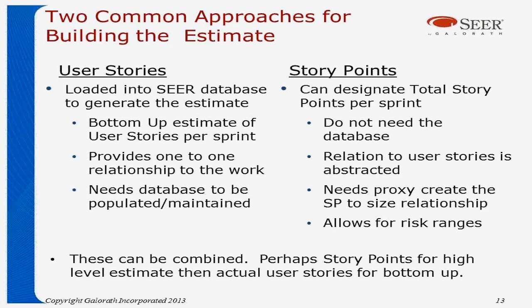Ideally, though, using story points, you can now accommodate risk ranges. Now, both these approaches can be combined. You might want to use story points for the high-level estimate, and then use user stories for your bottoms-up estimate or to load your sprints.